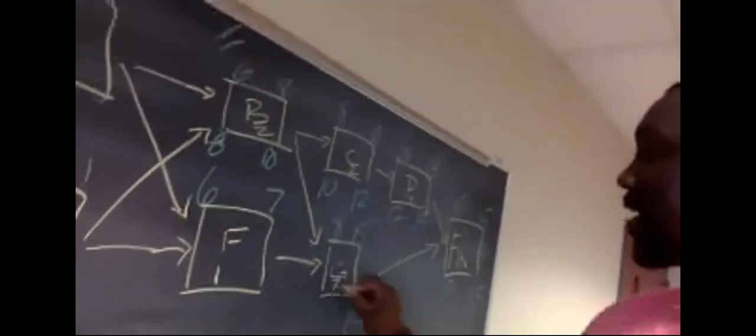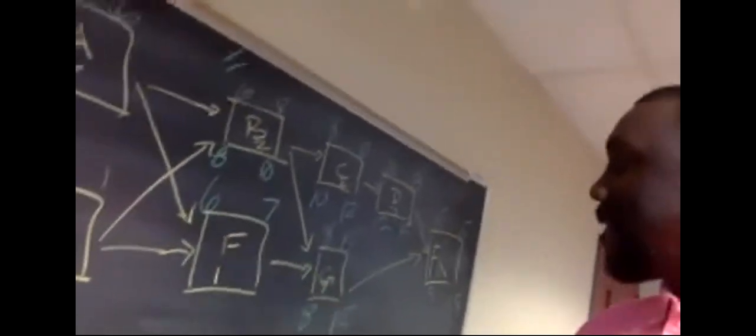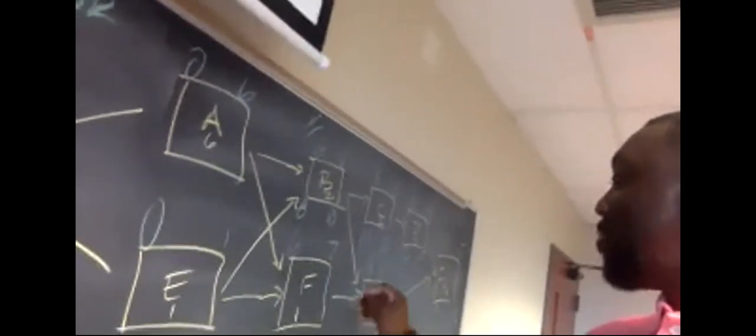Now, I don't know if I could bring my 8 over because I got a convergence point right there. So I just stop. Okay. I bring my 15 down to G. 15 minus 7 is 8. Do I bring my 8 over or my 10 over? That's a good one. So I got a 10 and an 8 right here. 8. I bring my 8 over.